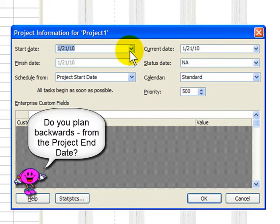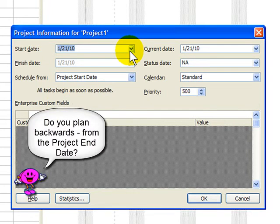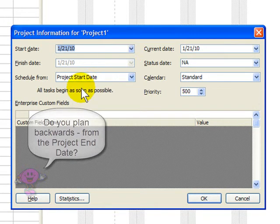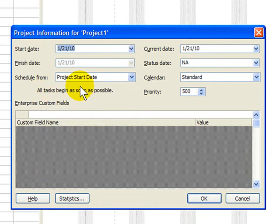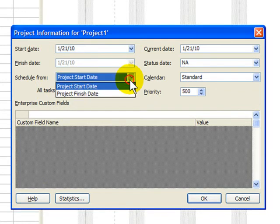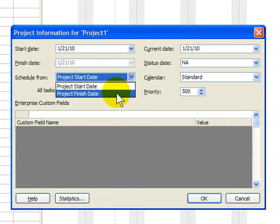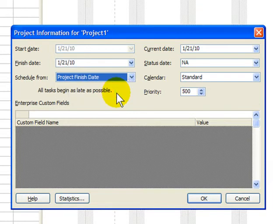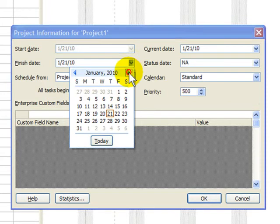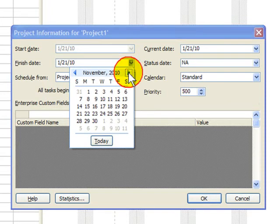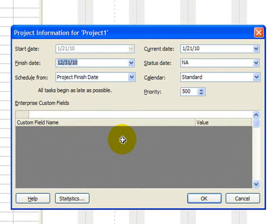You know, some people actually work backwards and don't schedule things from the project start date. They actually schedule things backwards, meaning they select schedule from the finish date. That's why they can put in a finish date, like we must finish by the end of 2010, and they might be compelled to put in December 31st.